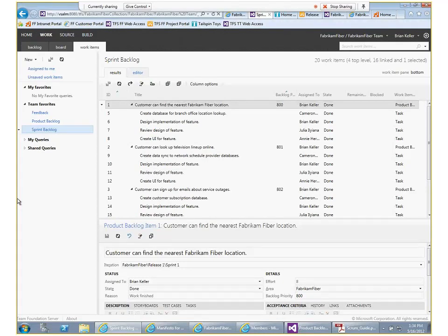Now, what if you add, for instance, finalize or fix architecture as a technical debt PBI? Then you have to talk to the customer and explain the value of that, right? So the customer has to perceive the value, and when you deliver that, the customer has to know that they're paying for something that's valuable. And of course, guys, the T stands for testable. And that, of course, is a cue for us to continue in the presentation by looking at the next step.